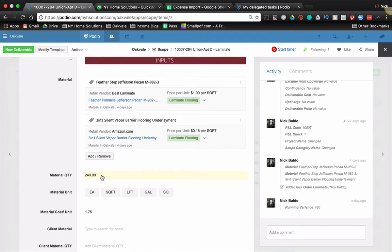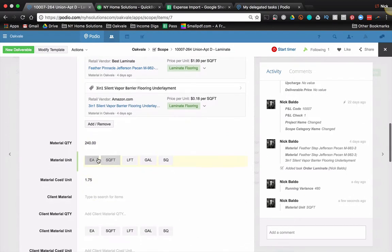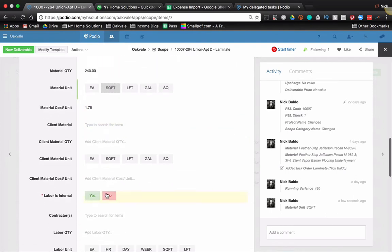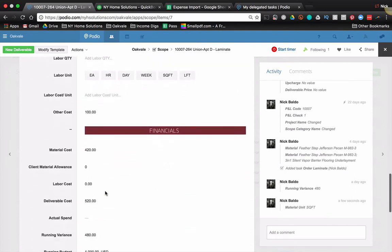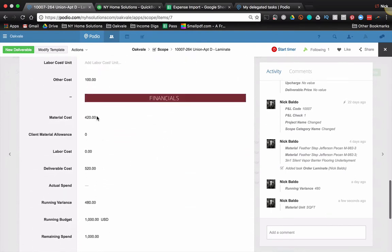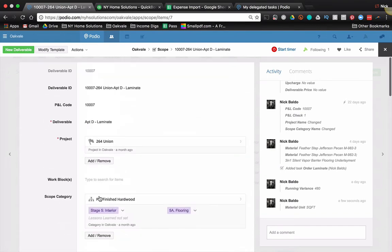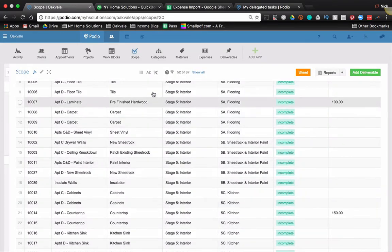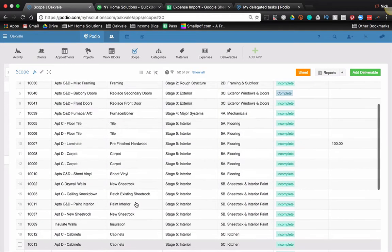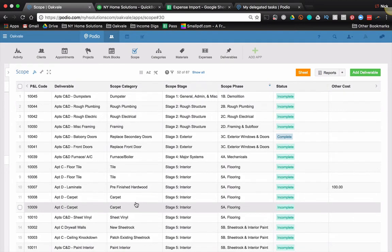So my material quantity, this is a price per square foot. My price per square foot is one seventy-five. And that's going to give me my total material cost plus other cost is five twenty. So all of these app items make up my scope of work for a project. And then I'm able to total the total budget and all that.